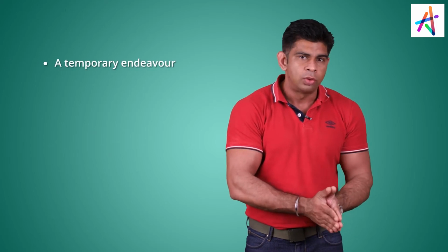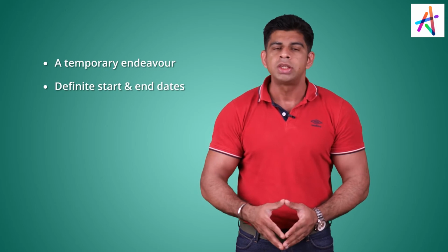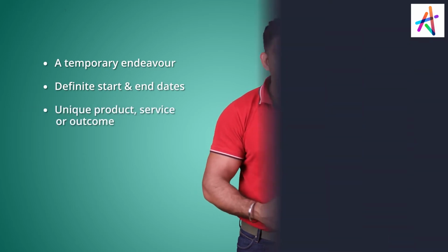Now, for example, creation of a house. So many other houses have been created, right? So is that not a project? Not really. Every house is unique in itself, right? But when you are coming up with exactly the same product again and again after the initial development is done, that pretty much becomes operations. So as I said, what's a project? A temporary endeavor with a definite start date and end date, taken up to create a unique product, service, or an outcome.